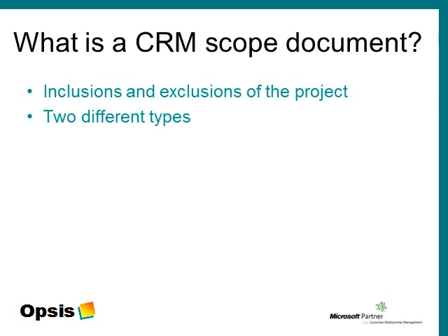There are two parts to a scoping. Prior to selecting a technology, the key and usually high-level requirements need to be identified so that the appropriate technology can be selected and the project not be compromised by the technology selection. Once the technology is selected, a more detailed exercise should be undertaken so that the implementation of the selected technology can happen uneventfully. While scoping can be straightforward, it does require the collation of a lot of information, often from many people and in different forms. This presentation aims to help you collect the appropriate information.